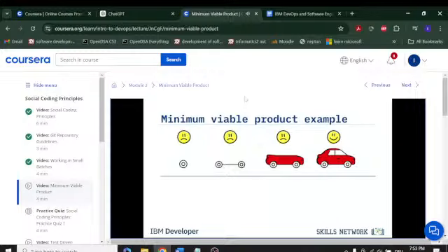And they give the customer a chassis. And the customer responds, I still can't do anything with this chassis. And then they give them a car with no steering wheel. And eventually, they get the whole car. Now the customer gets this coupe, and there's no feedback along the way. The team didn't know until the end whether the customer is going to like what they built or not. The team did not understand how to create a minimum viable product. They were just doing iterative development with no regard to whether each increment was useful or not.